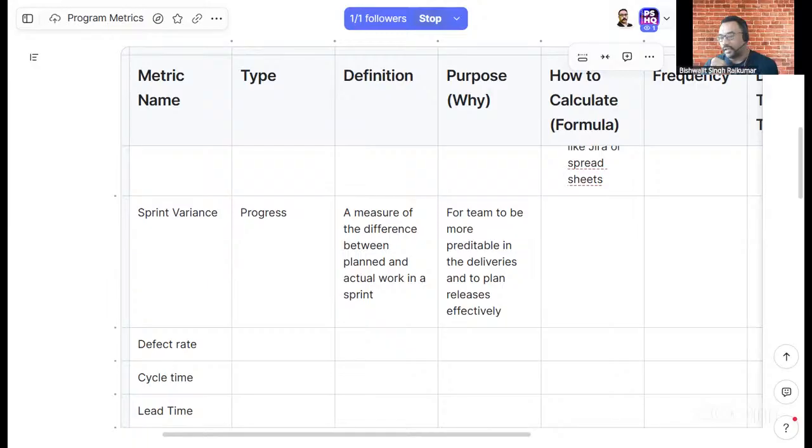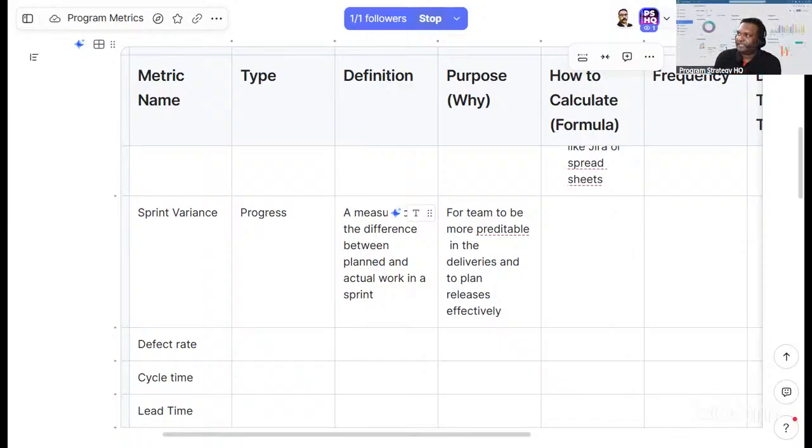Basically, isn't it similar to what we have about the sprint velocity? Yes, velocity is a basic thing. On top of that, we need sprint variance also because this will normalize a lot of things. When I say that, what I mean is, in case our variance is within a certain bound only, we will have much more confidence that this team will be able to do it.